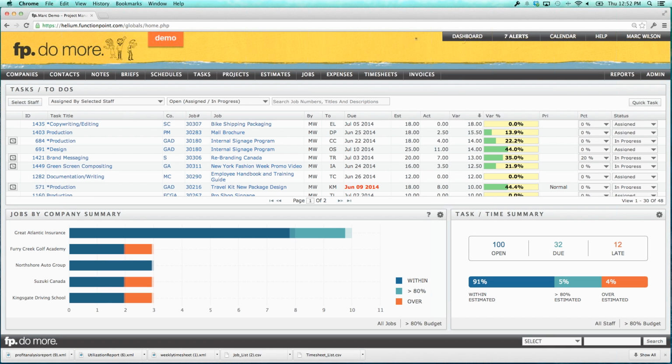Now, if a person's not working 2,080 hours per year, they're working 2,500 because they're one heck of an awesome employee, then adjust their cost rates to reflect that. Those are the types of things. Those are the decisions that you can only make by seeing patterns, and you're only going to see those patterns emerge if everyone's tracking their time. You have cost rates in there, you have targets in there, you have the work calendar in there, and you're able to look and see things over time and make better decisions based on those patterns.